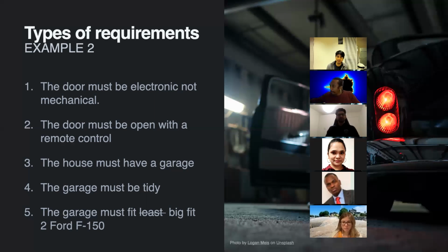So we need to tell, if we have a table of business requirements: the mansion needs a garden. This is the first business requirement, and the second business requirement is the mansion needs a garage. And then we create a table of functional requirements, and we write a functional requirement: the door must be electronic and non-mechanical, and we know that it's a functional requirement.